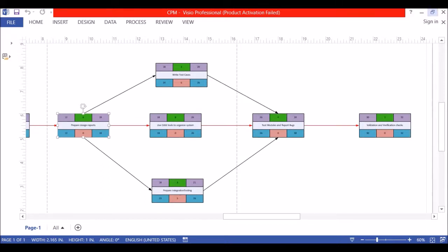Okay, so now that we've discussed how to find the earliest start and finish dates, to get the latest start and finish dates you have to start backwards. So start with 32, and instead of adding the duration time, you're now subtracting the duration time from the end time. So 2 from 32 is 30, and you carry the 30 across, and 4 from 30 is 26, and you carry the 26 across to each of the 3 boxes.